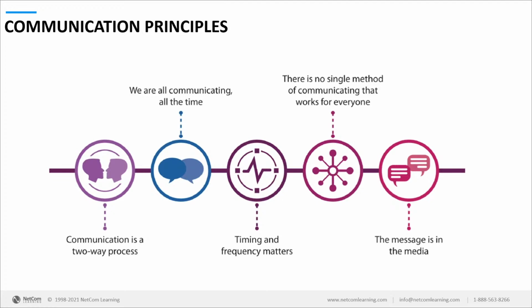The human resource manager is probably going to be looking for how many more resources are needed, and what is the utilization percentage of resources that are already allocated to your project. So every stakeholder is going to have a different communication requirement, and you need to manage that as per their requirement. The message is in the media.